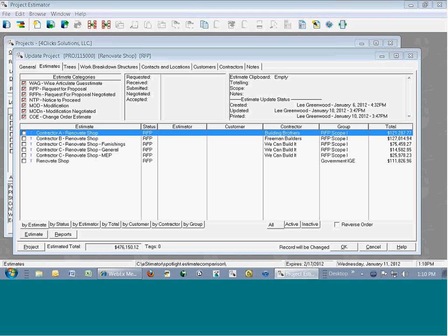We've got some people now utilizing the software. And so this current version that we're about to release with the 2012, you cannot compare multiple estimates. So we've made a first stab at it, and our thought with it is we want to let you at the division level immediately identify, by maybe the dollars as well as the count of line items, what the contractor's charging for overhead and profit. So in this situation here we've got an owner's estimate that's about $111,000 in one estimate, we also have 3 contractors in here submitting proposals. One of those contractors has built 3 estimates, the other 2 contractors built 1.